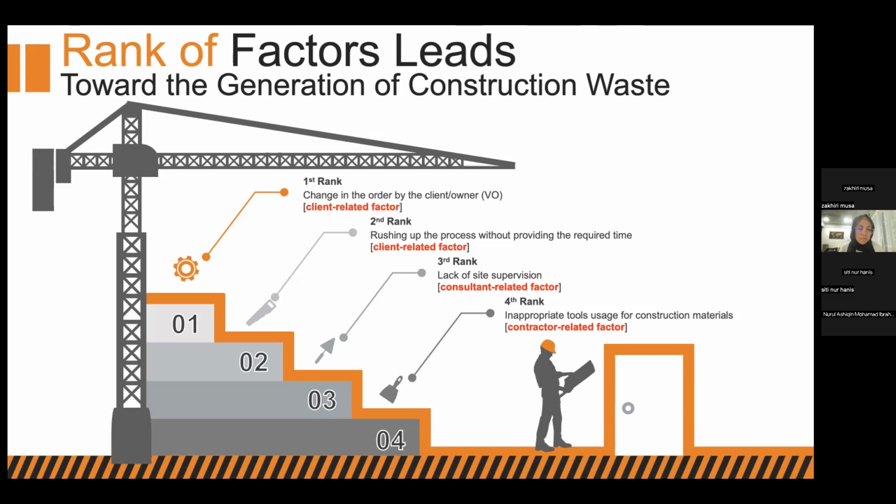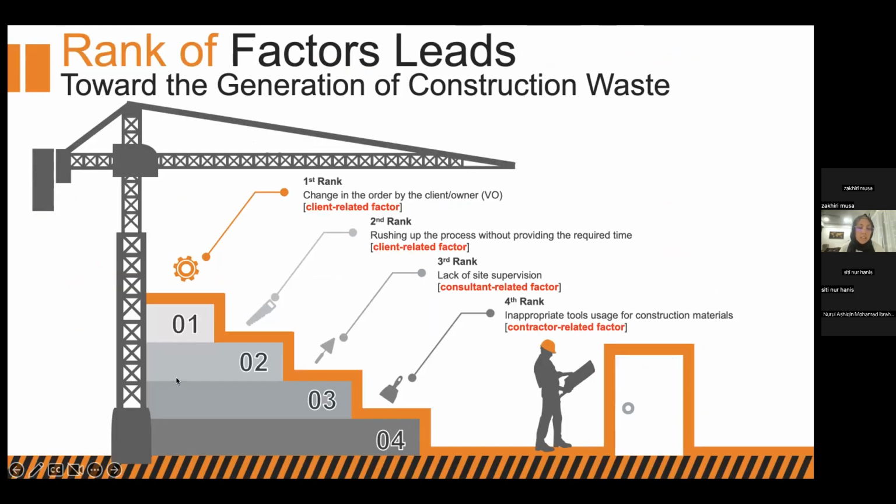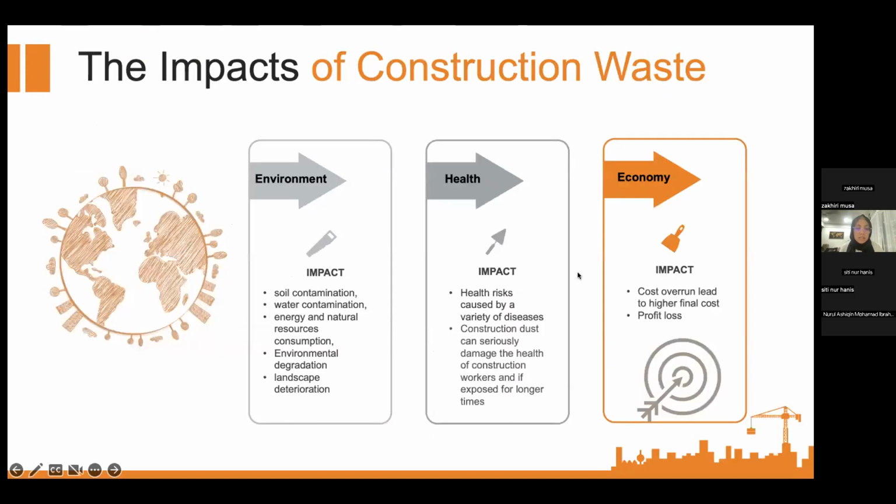Yes, I agree with the findings. If you look at the findings there, they said the change order can lead to more construction waste. It's true. Like Sazak mentioned just now, the work is already done, but when the client is not satisfied, they have to demolish and redo the work again. So it can cause a lot of waste. So that's why it's a high rank. Actually, it's what is happening on the construction site. Yeah, good. Next.